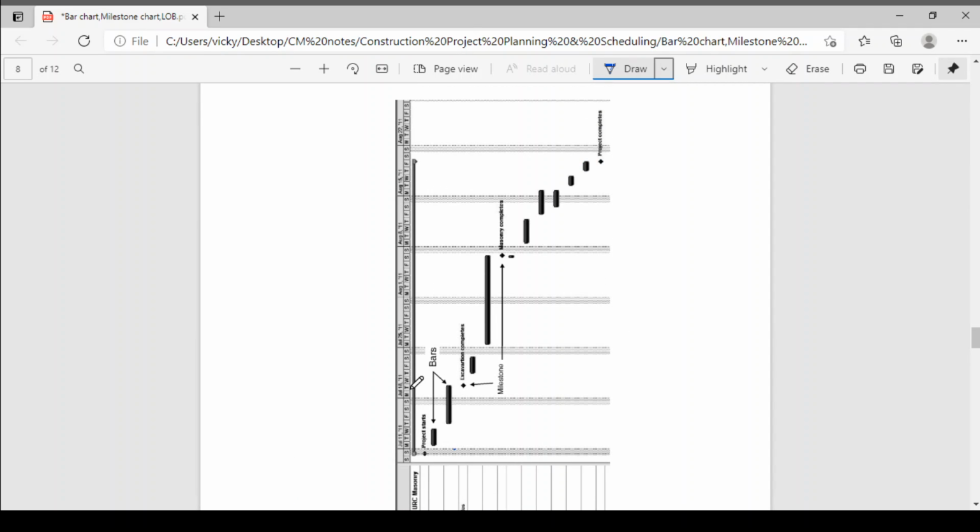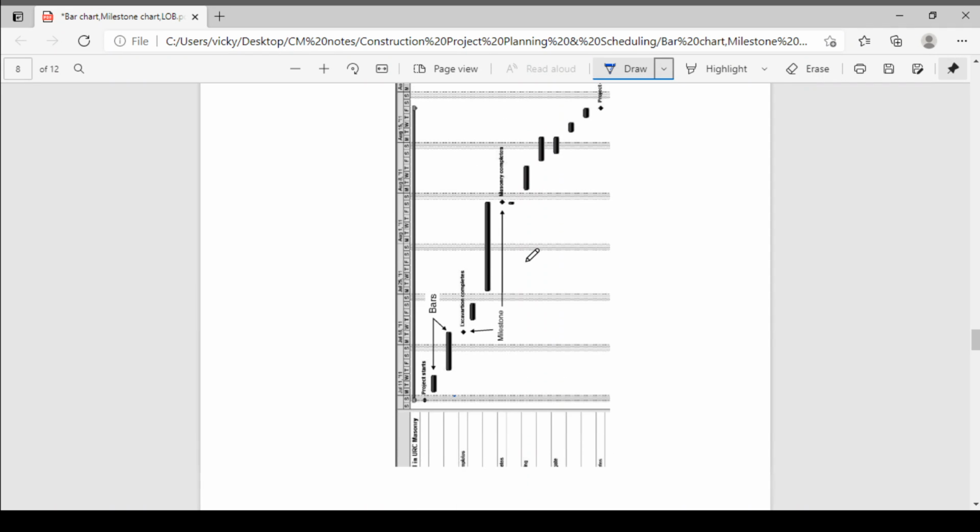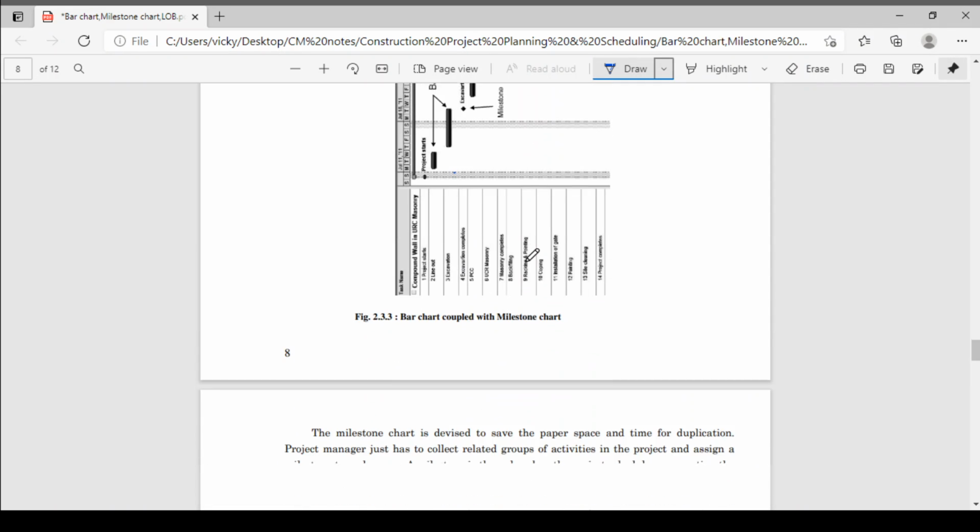Generally, for large projects previously, we would prepare milestones at every important stage, means up to the completion stage we prepare one milestone. So up to the completion of excavation we prepare a bar chart, and after that we prepare another bar chart, and this is another milestone. In between two milestones we prepare a bar chart, covering the activities between the two milestones. So we prepare small bar charts and combine them, so it is easy to maintain. Like that, the work was done previously.